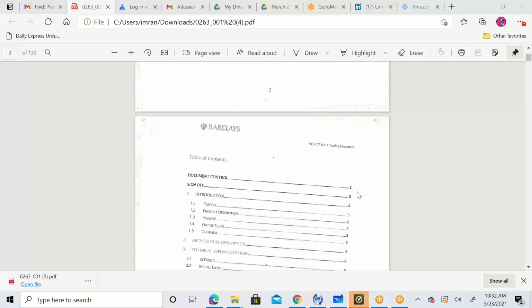When you're doing this kind of work, you have to clone everything again. You're not going to use the existing document as is. You need to rewrite the BRD by cloning the existing BRD and adding new features into it. You need to clone your FRD or user stories, all the functionality which already exists, plus the new functionality which you're going to design. For that, you need to do documentation.